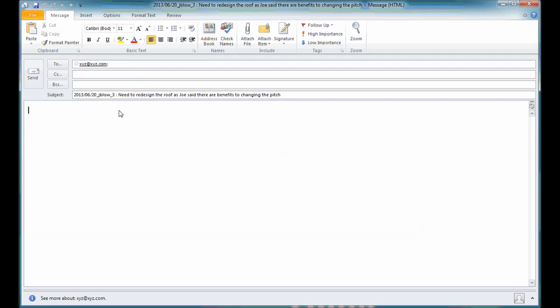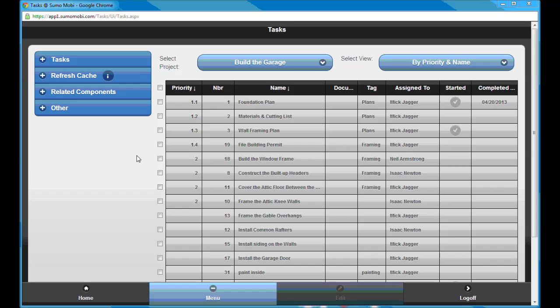By the time you create the task, the email identifier can be entered into the Document ID field. Only the ID part and not the rest of the subject needs to be captured in the Document ID field. The remainder would make up the task name. Of course, if you start the task before the email thread, you would have the task number and can use that as the identifier for the email thread.